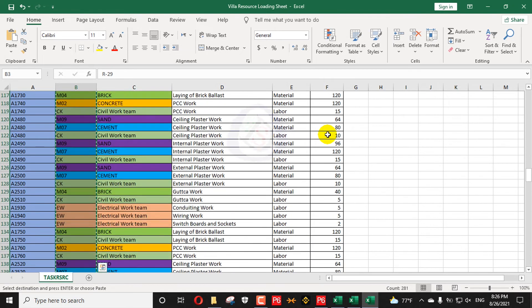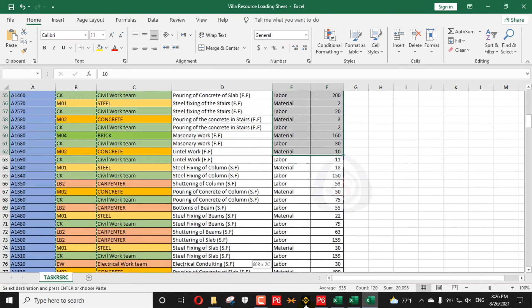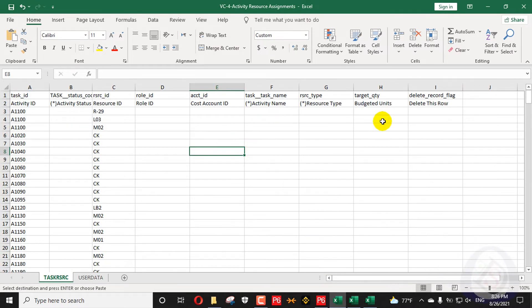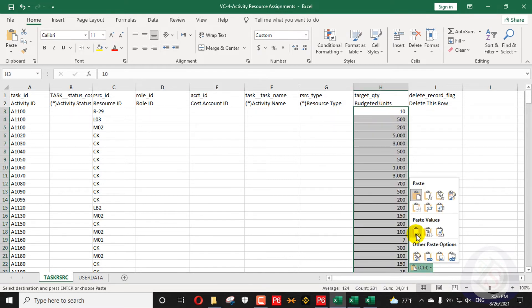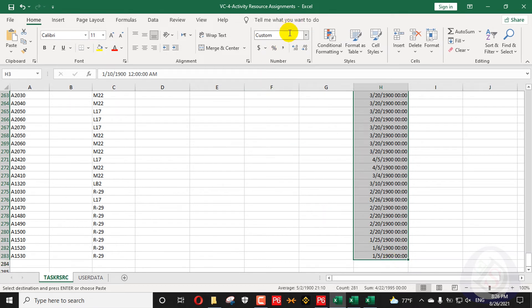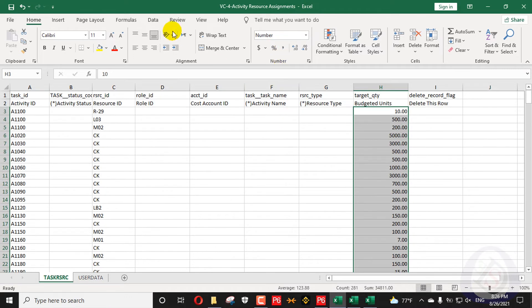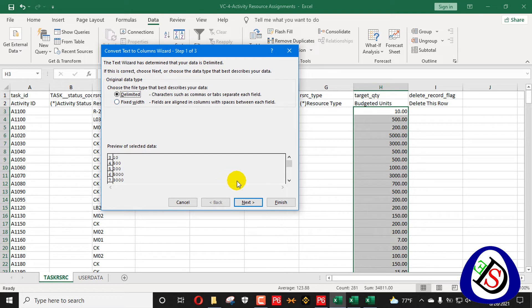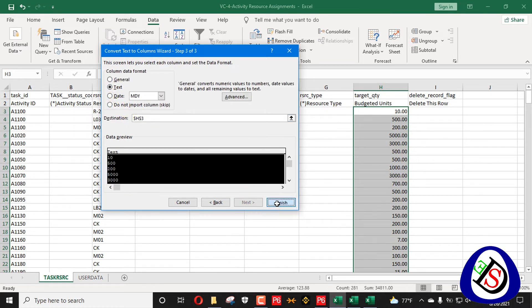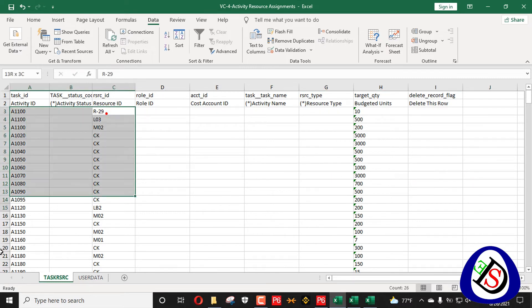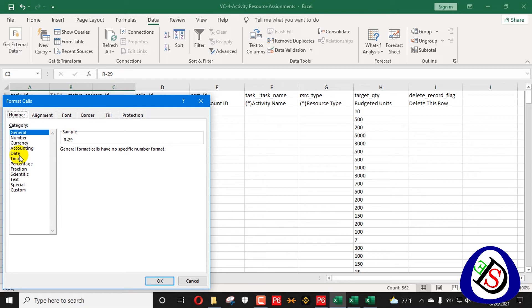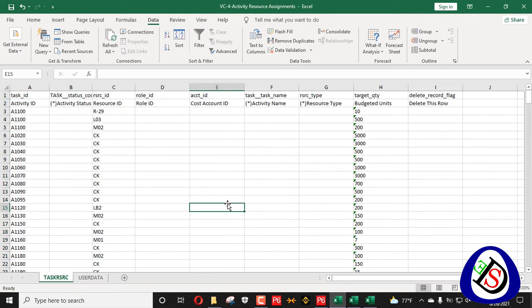The last required field is the total Budgeted Units — these are in hours, or for material, any unit value. I will paste these final units, then format the column as Number. I will also use Data > Text to Columns > Delimited > Comma > Text to convert the values, and format cells as Text. Then save with Ctrl+S.